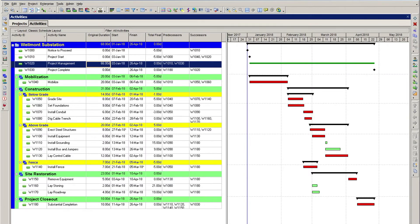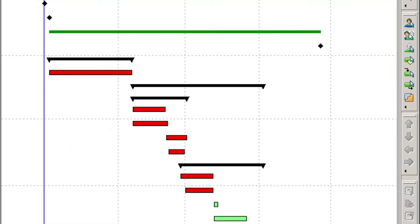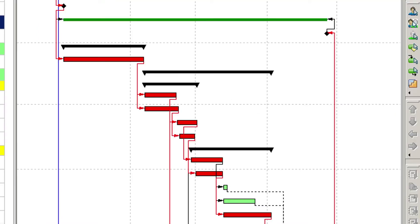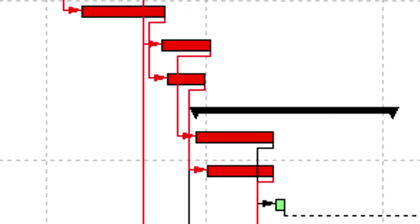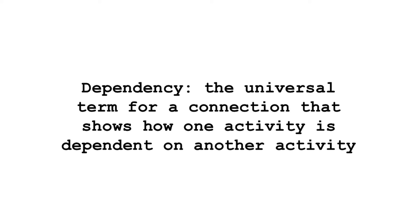One of the most challenging items when creating a schedule is to build logical relationships between activities. Also referred to as dependencies, all activities should have an allocation of their dependency to another activity in the schedule. In this lesson we are going to look at some of the basic principles for building dependencies into a schedule. So what is a dependency? A dependency is the universal term for a connection that shows how one activity is dependent upon another in a schedule.